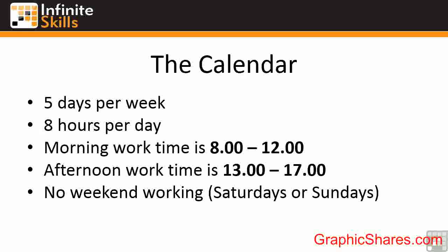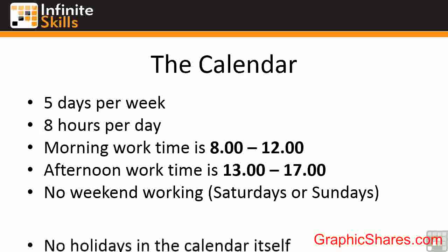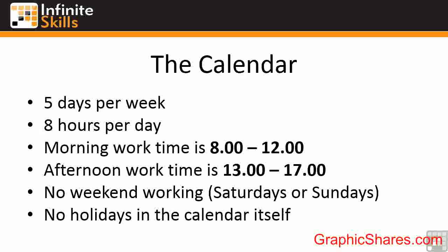No weekend working is included in the calendar. Obviously we can add that. And none of the bank holidays are included either. Now that is an important item to remember to add into your calendars, all the public holidays that effectively could make a difference to how long your project will take.